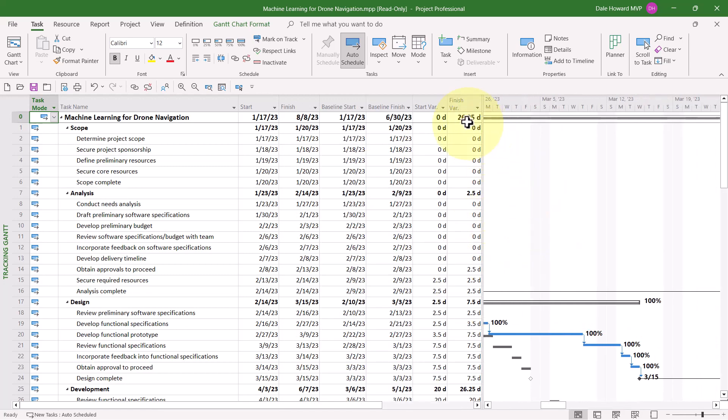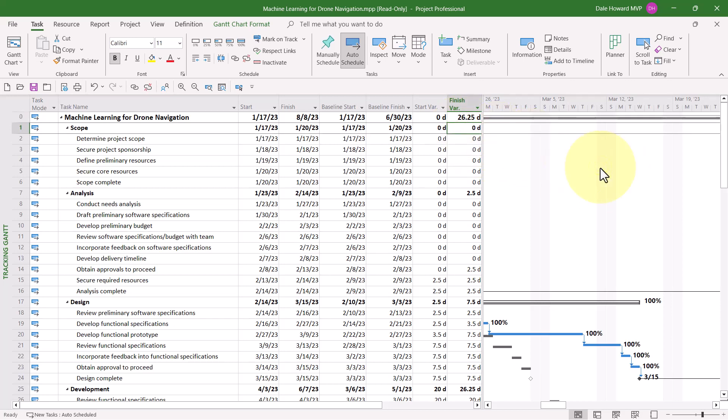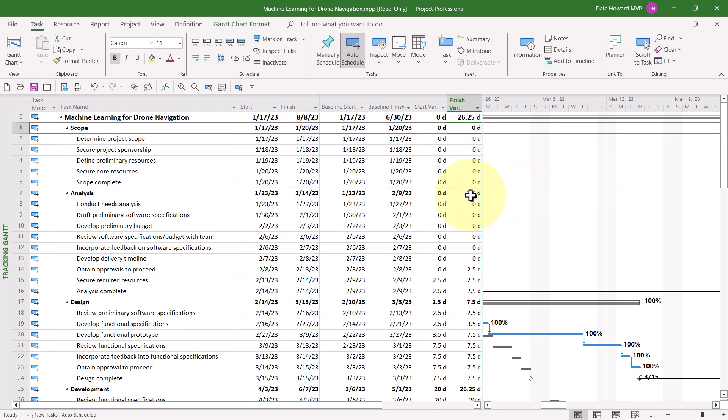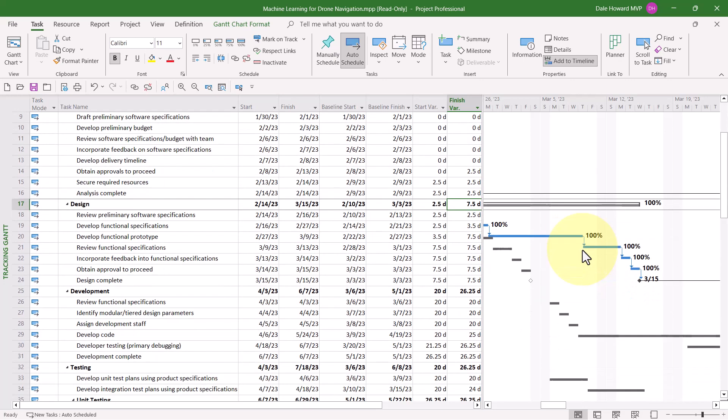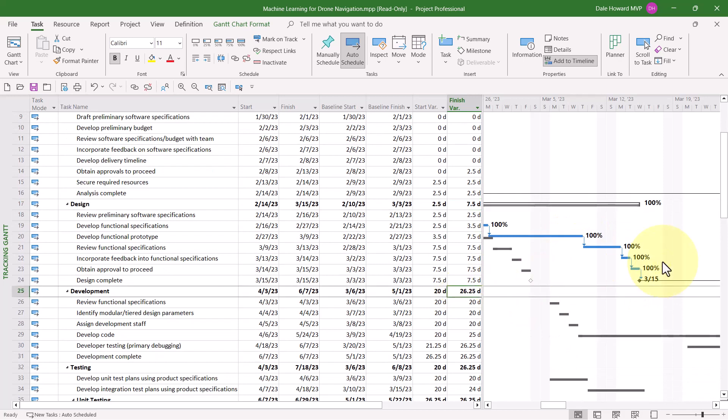For Row 0, the finish variance in this project is 26.25 days. That means this project is slipping over five weeks because 26.25 days is measured in working days. Now, as we go down through the project, the Scope section finished on schedule. The Analysis section was two and a half days late. The Design section was seven and a half days late. And the Development section is currently 26.25 days late.